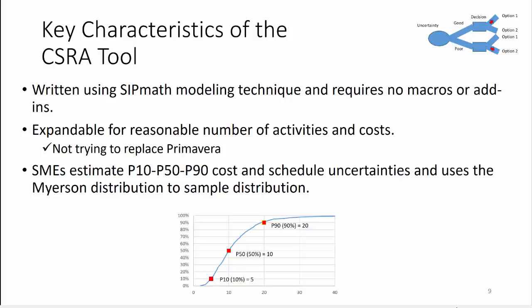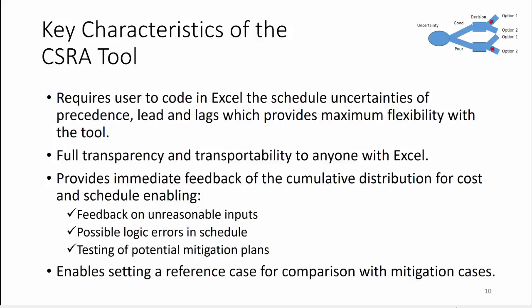What this means is you can estimate a P10, 50, and 90 — any three numbers — and the Meyerson distribution will fit them, as shown in this S-curve. The tool requires a user to code in Excel the schedule uncertainties of the precedents, leads, and lags, but this provides maximum flexibility. The tool has full transparency and transportability with anyone who has Excel, because it doesn't require any special software. It provides immediate feedback of the cumulative distribution for cost and schedule, enabling feedback on unreasonable inputs — so if you put in an extra zero somewhere, or have logic errors in the schedule, that would show up right away. You can also test potential mitigation plans on the spot, with no need to wait overnight to generate graphs.